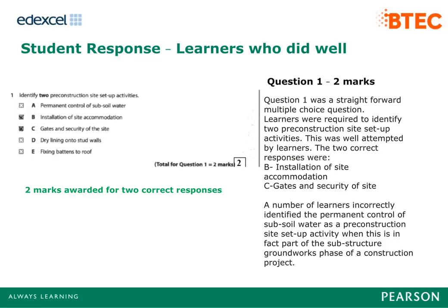A number of learners incorrectly identified the permanent control of subsoil water as a pre-construction site setup activity, when this is in fact part of the substructure groundworks phase of a construction project. The learner response shown was awarded 2 marks for 2 correct responses.